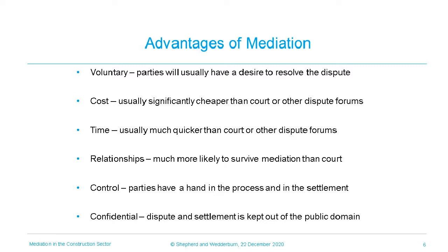This reduces actual costs, but there can also be value in allowing the parties to sort out their dispute and move on. This is especially prudent given the current workload of the courts. Proofs in the Court of Session were being fixed 2 years in advance, and this was before the backlog caused by the COVID-19 pandemic, which some commentators have predicted could take many more years to clear. Avoiding this drawn-out process can be of value in itself.